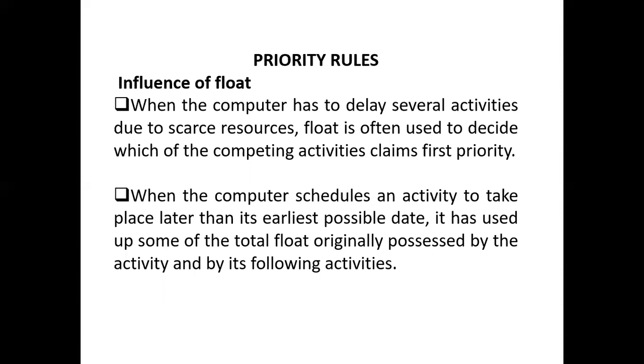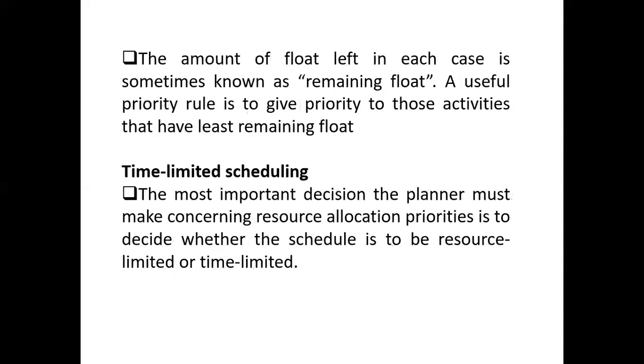Simply put, activities that have float, that have free time, can be put on the bench, so to say, when it comes to resource scheduling, and we focus on activities where there is no float and allocate all the needed resources. That's the gist of the matter. The amount of float left in each case is sometimes known as the remaining float, which we'll discuss later, perhaps in other subjects like planning and management.